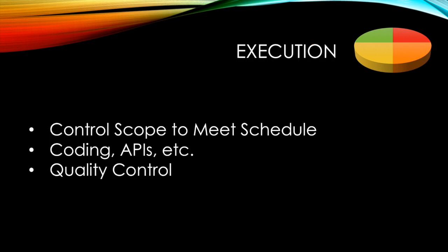During our execution phase, we made sure to keep our scope controlled in order to meet schedule. We realized early during the execution of the project that the task required to appropriately address all the necessary observations was not possible within the time frame allocated to this project, so we prioritized each observation. Developing using an agile method allowed us to include prioritized features into a working app as they pass our initial quality control. Coding was done using Visual Studio in C#, HTML, JavaScript, and CSS.